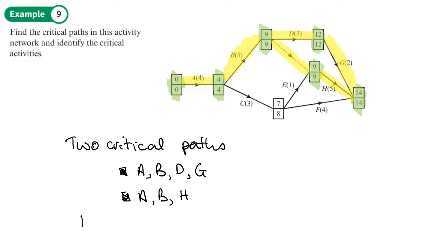Then if we're going to write down the critical activities, well it's all of the ones that we had written before. So A, B, D, G, and H.